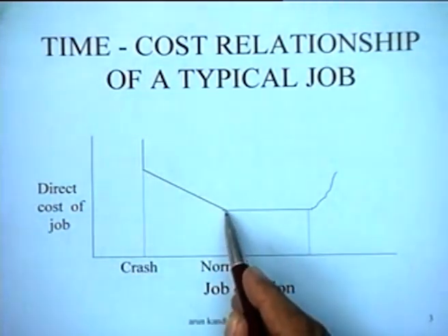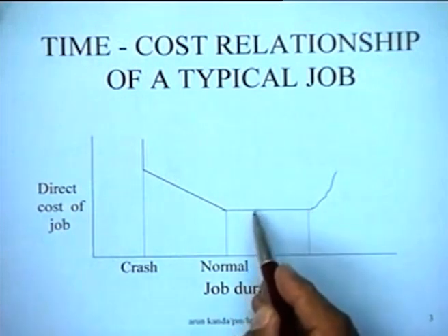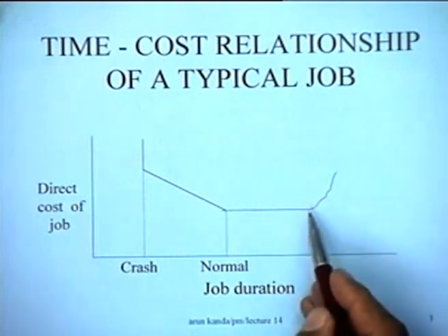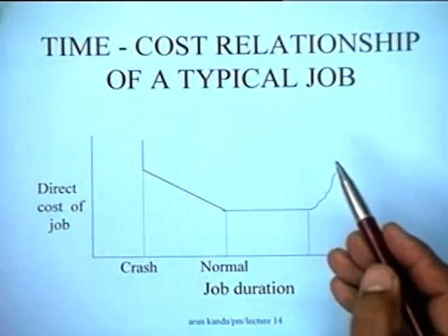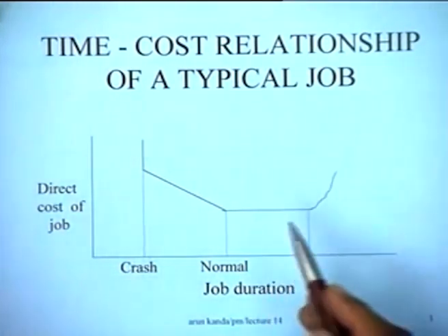It is quite likely that if we delay the job for some time, the cost is not going to change. But thereafter there are going to be penalties of delay. And the delay could be, you had bought certain material, the material goes bad, right? So the costs keep on increasing.